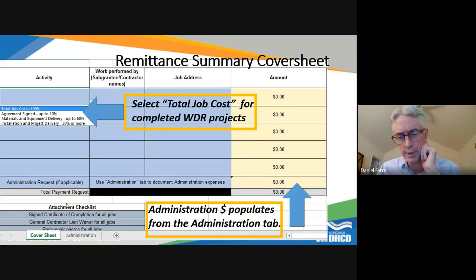Yeah, so sorry to sound like a broken record here, but Chase, if this is something that you know about the project up front, if this delay is anticipated, let's build something in terms of the project setup that allows it to be divided up in a reasonable fashion, kind of to tag on to what Willie said. So if you know that it's service panel replacements for these units, we may be able to sort of divide it up into 2 projects.